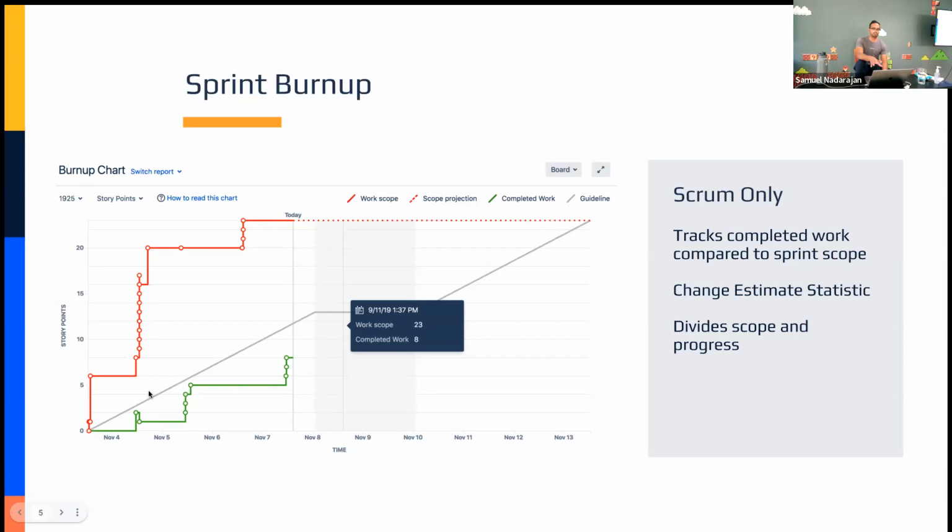going to change. The axes are going to change based on the data that's assigned to a sprint at a particular point in time. But if I was looking at this burn up report on like November 4 or November 5, this line that appears in the bottom quarter of this graph would be at the top, and that y-axis would be expanded. So the red line would be your total story points at the start. So if we had 20 story points at the beginning of the sprint, you would see a red line all the way across it. Yes.